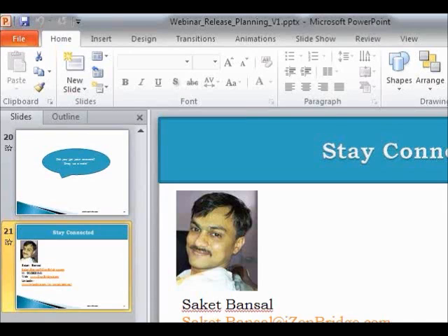The cost baseline and schedule expectations get set using the release plan. So if you are monitoring your project using earned value, the budget at completion is calculated on the basis of your release plan. In Agile, we focus on welcoming change rather than following a plan. So the release plan is also a flexible plan which can be changed to accommodate the business priorities.